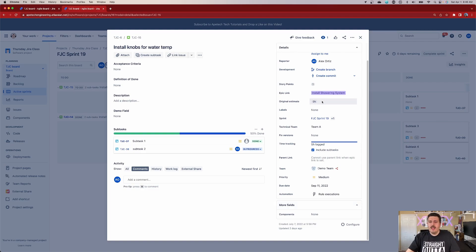So the original estimate, this one's a really important one, because unlike the story point estimate, which is really used to drive the metrics and the boards and the reports and everything else inside of Jira, the original estimate, while it can also be configured to do all that, is a separate thing. It's usually designed to track like labor and actual hours and more concrete numbers versus the story points is usually a pretty good whack.